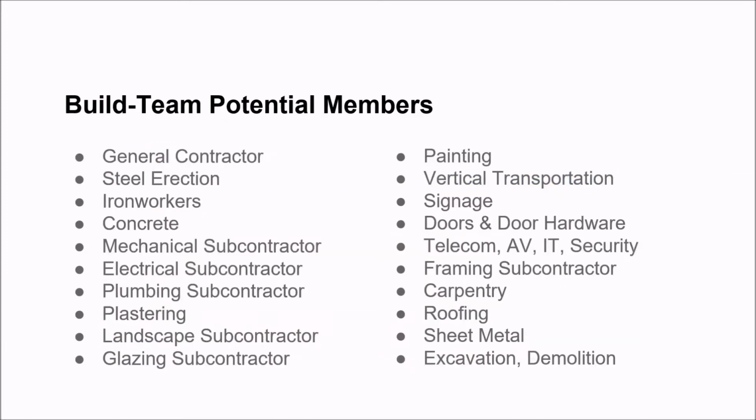It is also worth a reminder that under a general contractor are often a whole host of subcontractors, and during the construction process, those entities are responsible for developing shop drawings. This has incentivized subcontractors and general contractors to utilize BIM. Additionally, many of the key trades are developing even more detailed building information models than the design team to run precise clash detection and avoid issues in the field utilizing software such as Navisworks.